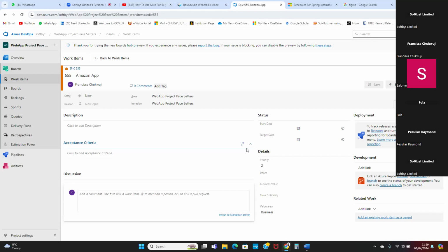No, this particular one now, Francisca is just practicing. You usually don't assign this epic to anyone. The assigning starts from product backlog. But it's the same interface. Everything you're seeing here is the same thing, the only difference is the epic icon on it. The way she assigned it is the way you assign it in product backlog, but the assigning starts from product backlog, not epic. Thank you for asking that.